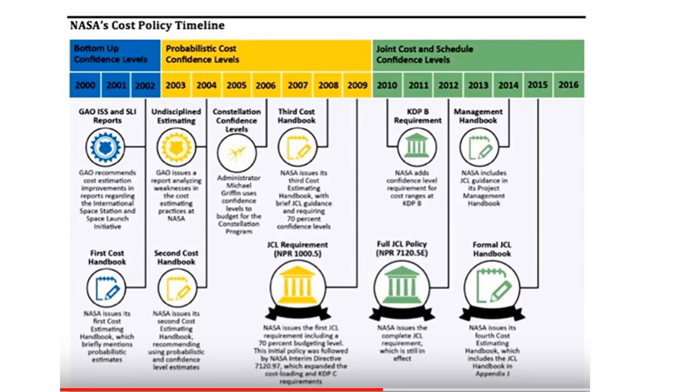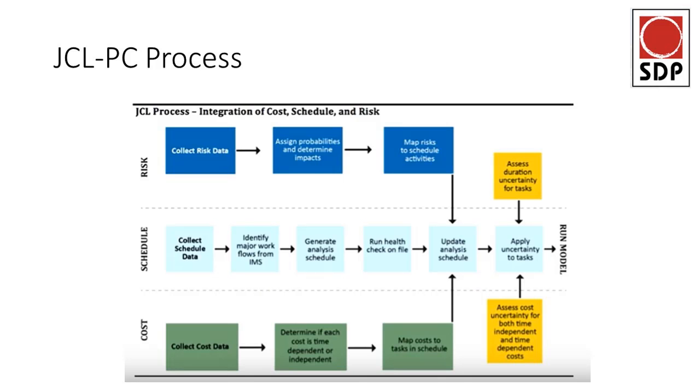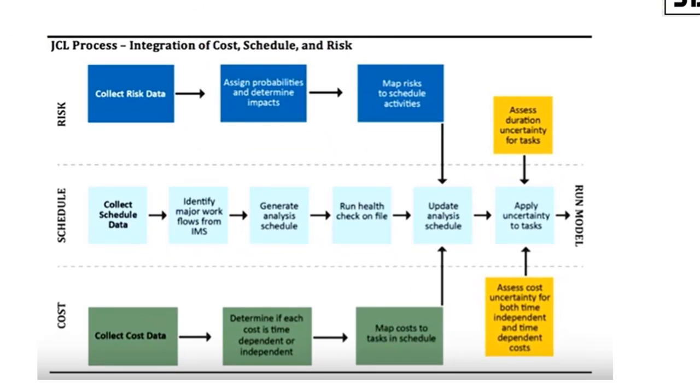But if we can move to the next slide, just in terms of the general process that one would typically go through. Brian, just click over. You had that other little timeline in there. So we would collect all of our risk data. Especially as far as mining is concerned, if it's got a bit of a process plant involved, for systemic risk, I like the AACE distinction between project-specific and systemic risk. Project-specific typically comes out of your risk register. There's no big shakes about that. Systemic risk element, a lot of parametric data if they have that available, but typically we go and build mines in a new geology, etc. So I like to put in place things like the PDRI from the Construction Industry Institute. I like to use those kinds of tools, or the Hackney model when it comes to process plants, to get a handle on systemic risk.